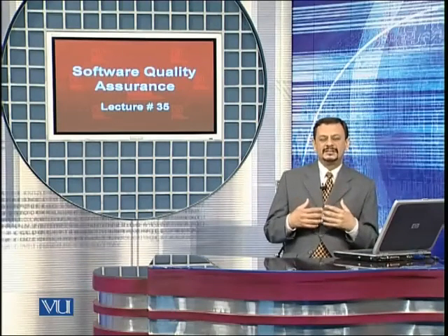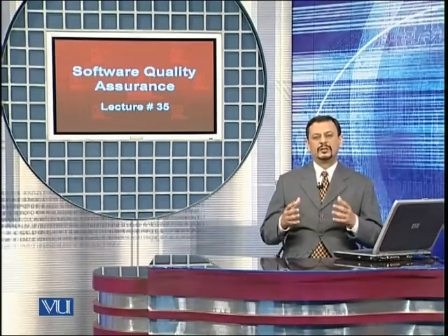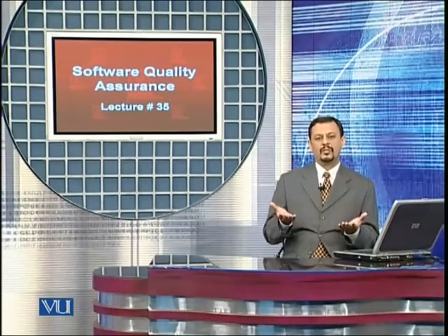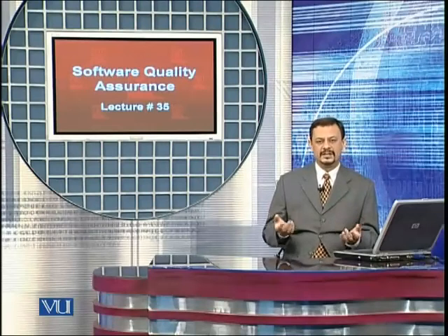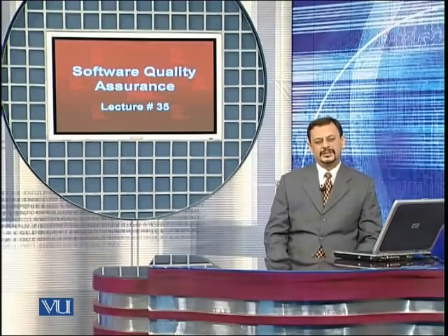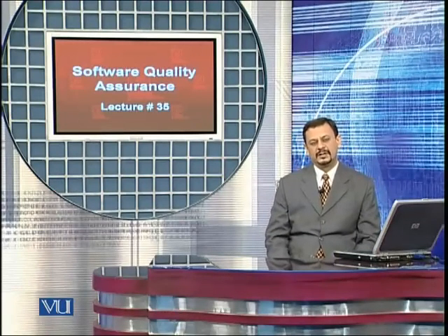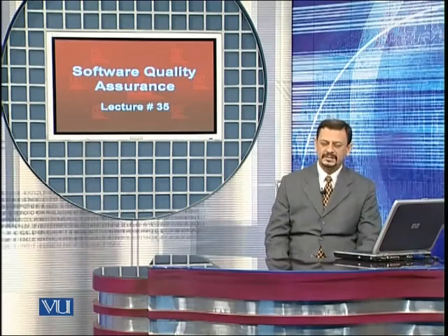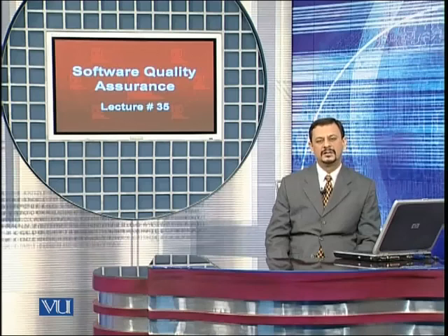And the picture that we have just seen under management commitment also highlights this fact, that we need to balance both the development effort as well as the software configuration management effort. An SCM organization requires three kinds of personnel. It requires auditors, configuration control specialists, and status accountants. These positions require hard work, creativity, and dedication.